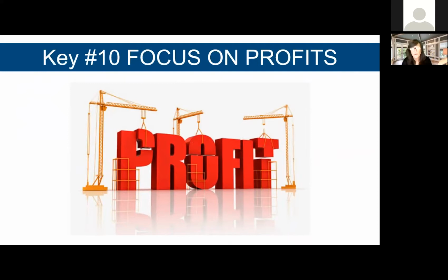Your ultimate goal with managing your resources is that people not only are going to be billable, but you're also going to have high realization, meaning that you can charge your clients for their time. If your projects are consistently going over budget, then people are actually spending their time doing things that aren't valuable for the company.